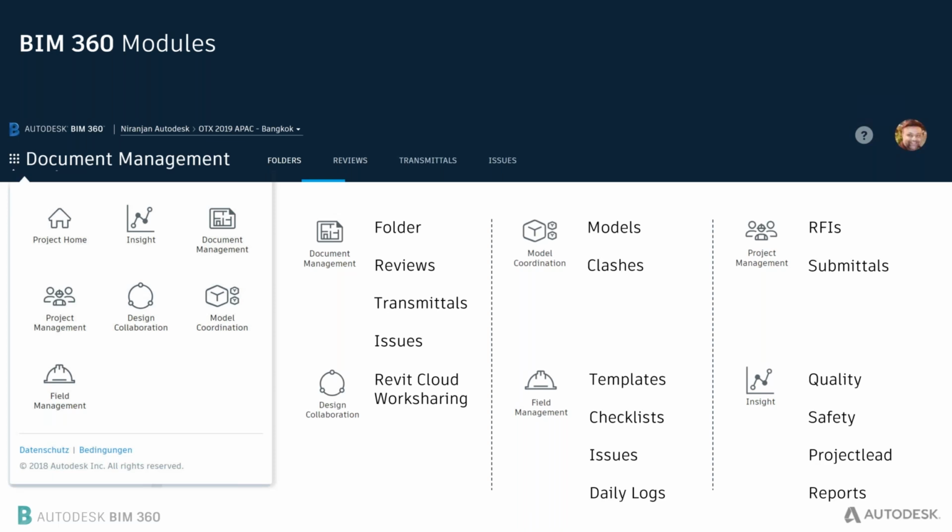So whatever reports you are downloading from the insight page in terms of issues and related reports, you can connect that data to Power BI also. As a BIM manager, or at director or executive level, you can have a complete overall view of the project, whether we are on time or delayed by 6 months or 1 month. It gives you the time delay too, because whenever you create a project you give it a start and end date, right? Based on that it will give you the project delay days also.